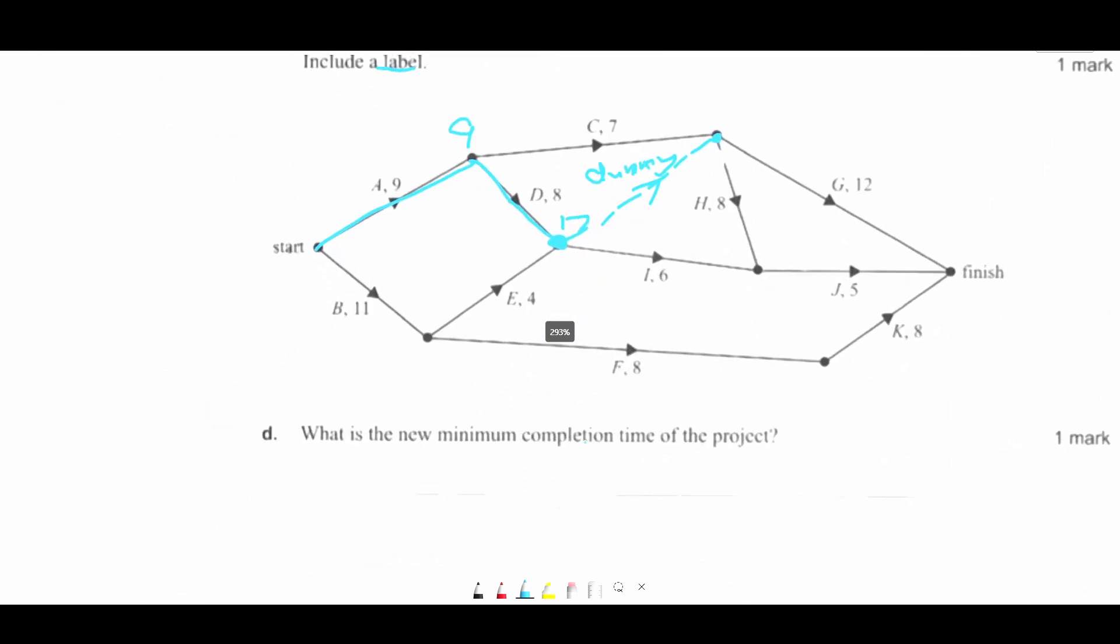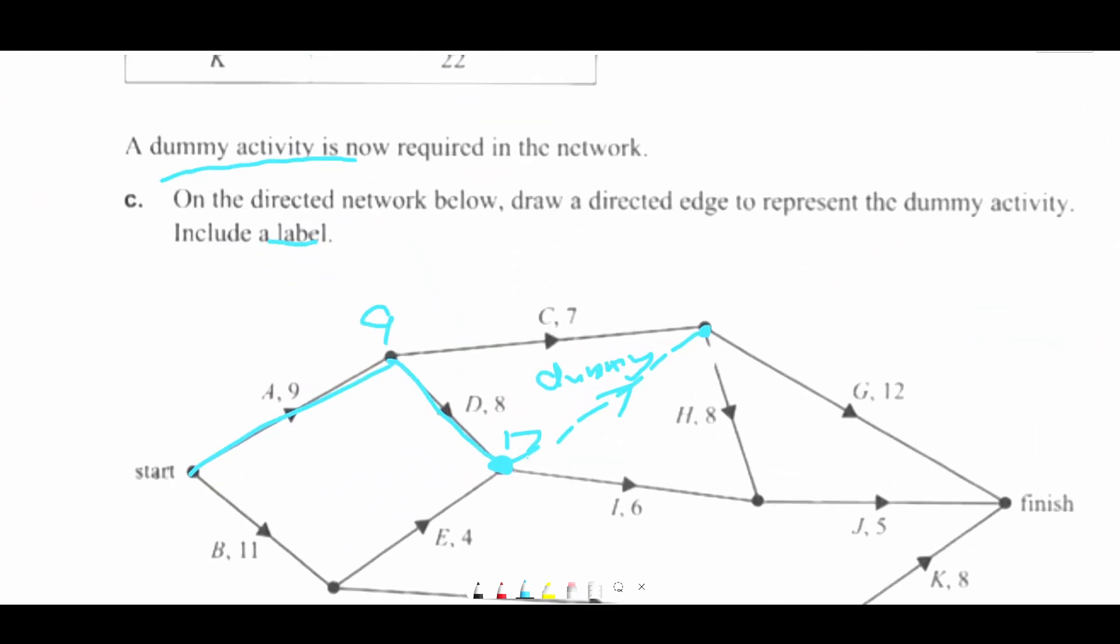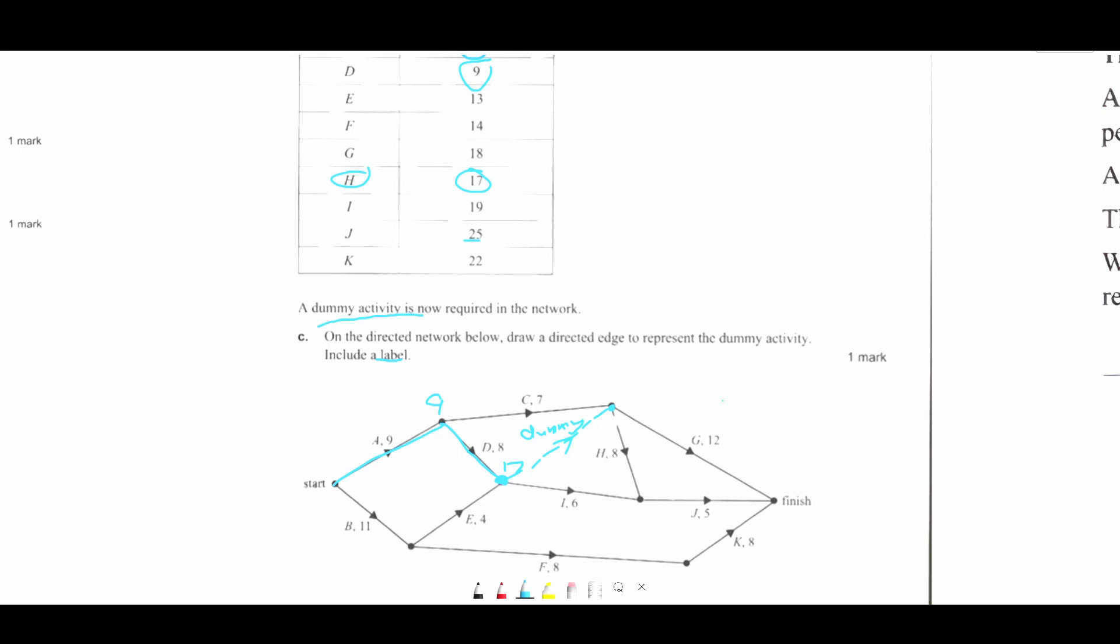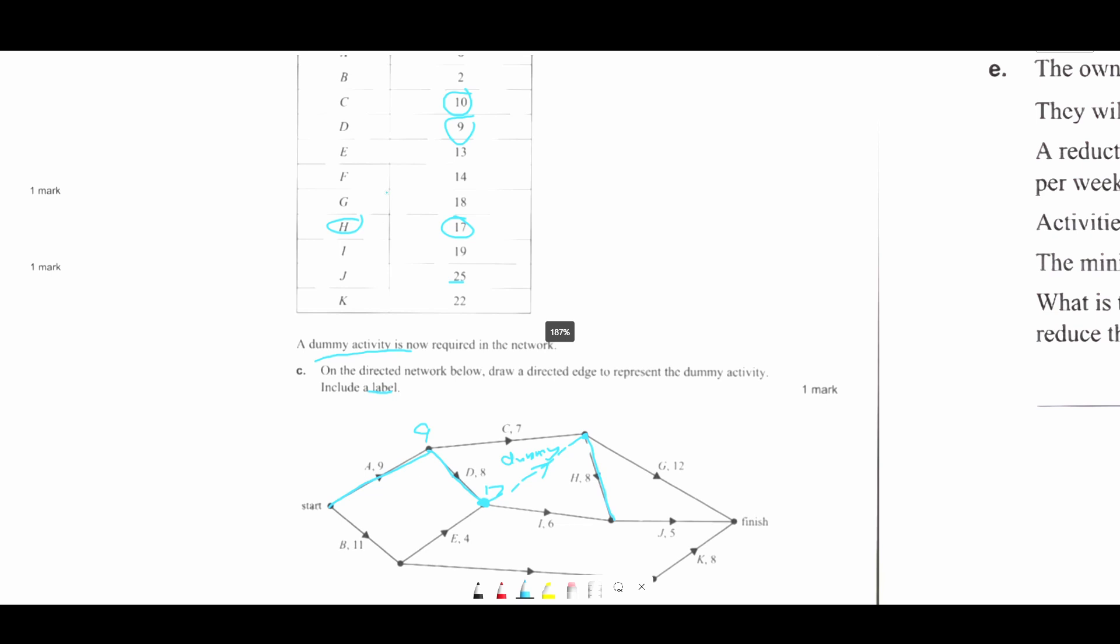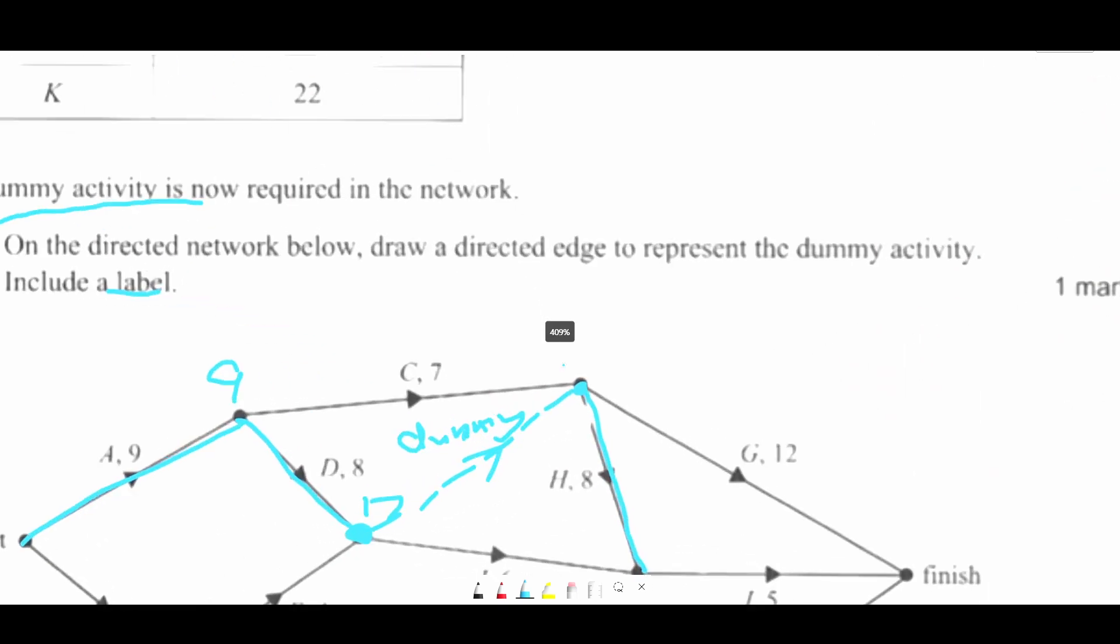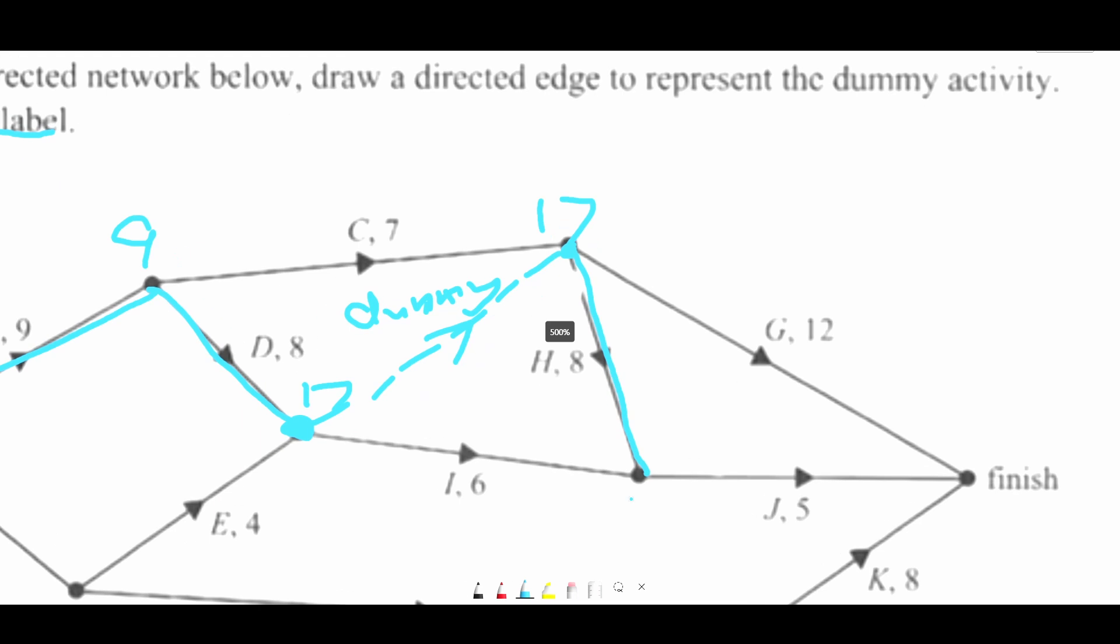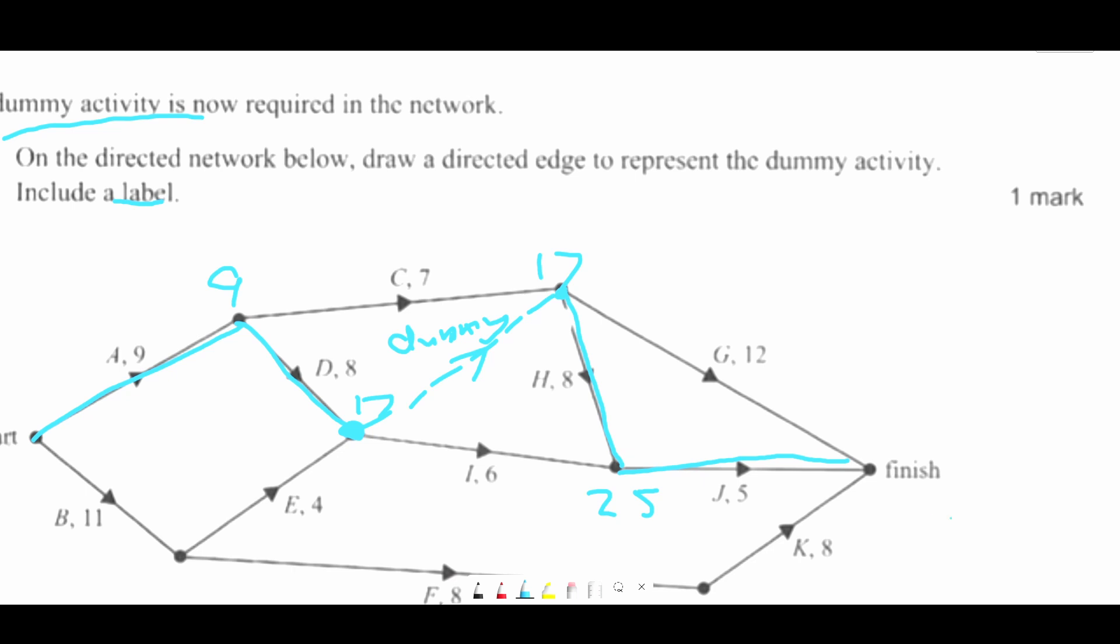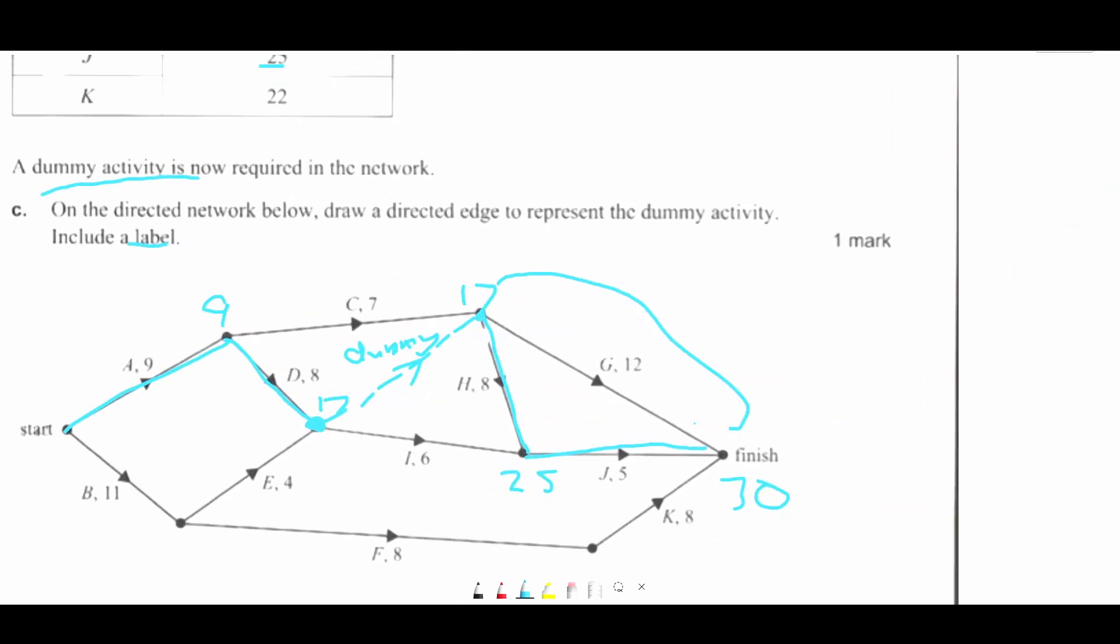What is the new completion time? So we know that this is the critical path. It goes down this way. So 17. So this 17 just gets transported up here. And 17 plus 8 is 25. And 25 plus 5 is 30. Are there any other possible critical paths? 17 plus 12 is 29. That is lower.